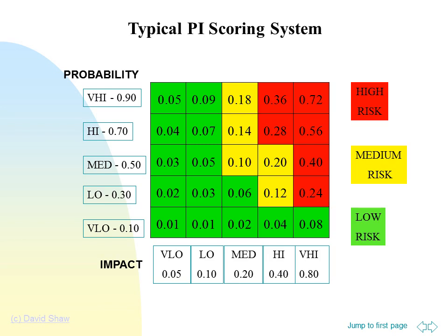A simple way of using PI scores is to plot the risks in a matrix. Using the numerical values previously established, we can plot all possible results. A risk scoring less than 10, shown in green, is a low risk. A risk scoring 10 to 20, shown in orange, is a medium risk. A risk scoring greater than 20, shown in red, is a high risk.